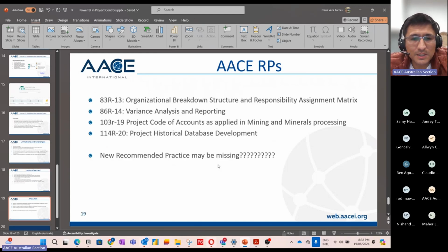Okay, I think I'm almost done. There are some AACE recommended practices. Nothing is applicable in the Power BI space, but it is relevant on the reporting space. So there are RPs, recommended practices, that talk about organizational breakdown structure, responsibility assignment matrix, and variance analysis. If you are proficient in the Power BI space, but not proficient in project controls, then these recommended practices are going to help you.